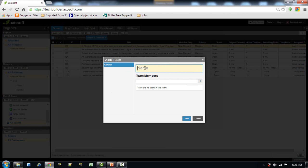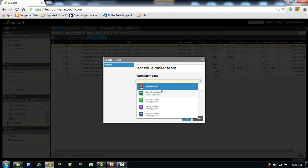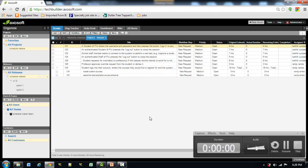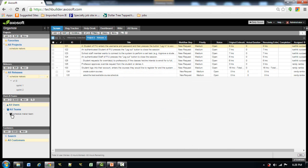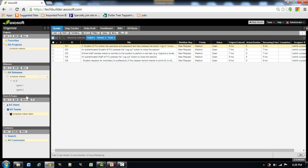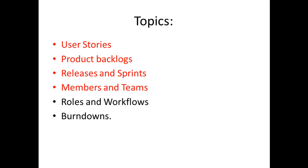Now as you can see in the Assigned To column, all the user stories are assigned to someone. We are assuming the user stories are assigned to the appropriate developers as per their request when forming the user story list, and the administrator has taken the task of assigning them. Now we create teams by clicking the Add Team button. We enter the team name and add team members. When we click on this team, we only see tasks assigned to those team members, making it easy to manage multiple teams.